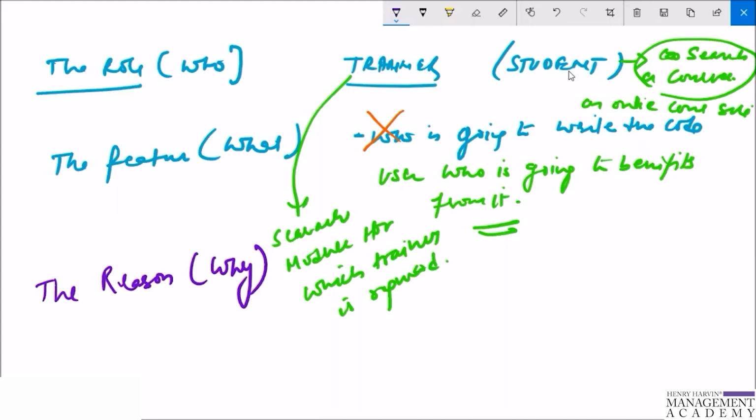This helps the product owner evaluate how to prioritize the user story on the backlog. If the value or the benefit can't be articulated, it might be something that is not necessary. Understanding the value often helps the development team find innovative ways to implement the code to solve the objective, ways that may be different from what the product owner has in mind.